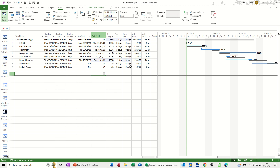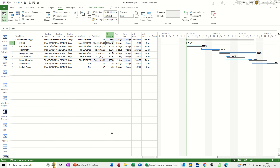This is not something you would do every single second of every day unless you've got loads of admin people. This is something you would set aside, maybe on a Friday or Monday once a week, and just go through it like this. It's nonsensical to type 100% and just drag it down a big long list — if you've done that you want to be questioning yourself as to why you've actually listed something as a task. Project is a very accurate tool in measuring how well you are doing against a plan; it will not measure that well if you're just doing 100% all the time.